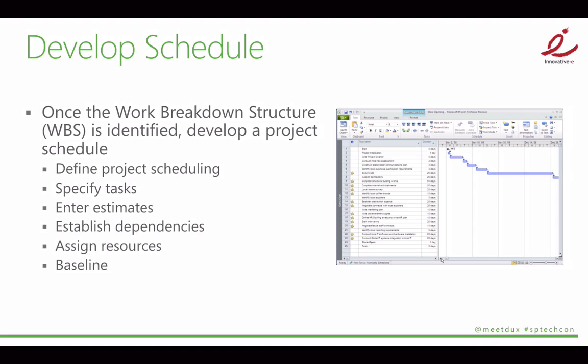IT is probably only available to do projects maybe 40% of the time, or 60%, or whatever that percentage is, because 5 of the 10 people are occupied with help desk and operational stuff. 80% of their day is help desk tickets, and the other 20% can be allocated for project tasks.